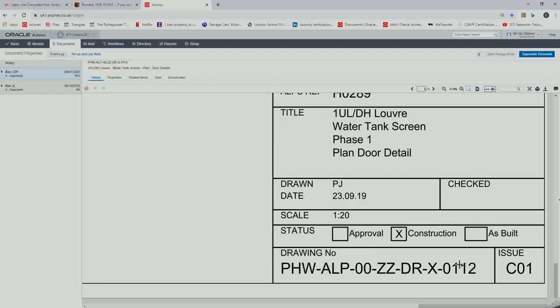Alright, for example, say this drawing number was 110113 and we're having 112 sent here. We would QA reject this, send it back to the other person and say, hey, the document number on the drawing and the document number on the transmittal that was sent are two different things. It's wrong, so please correct and resubmit. But in this case, it is good.